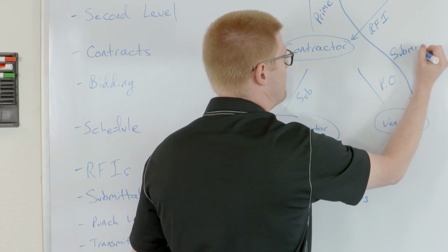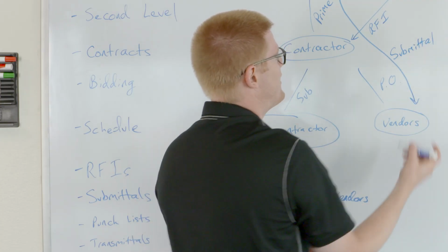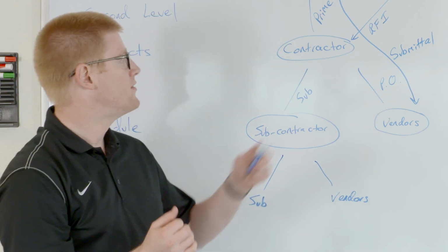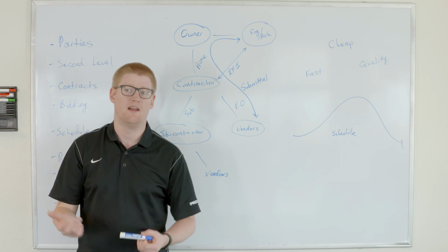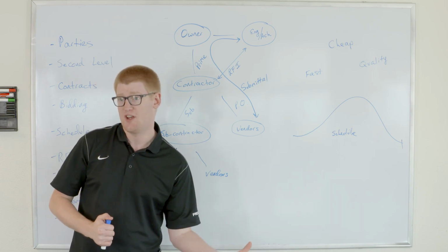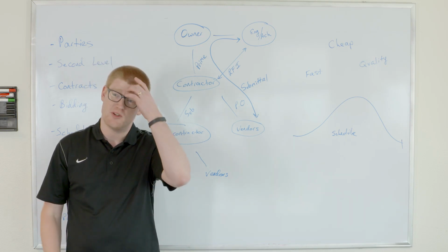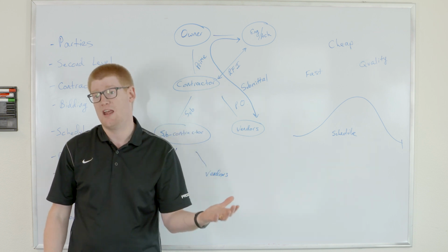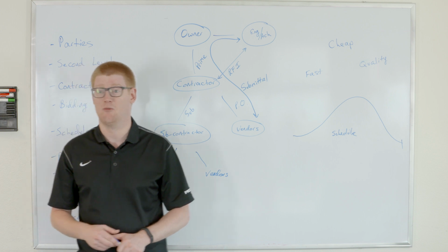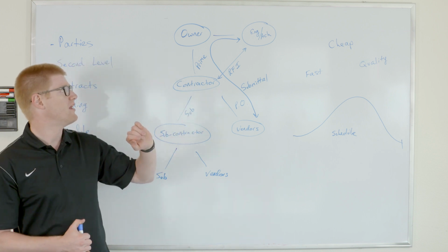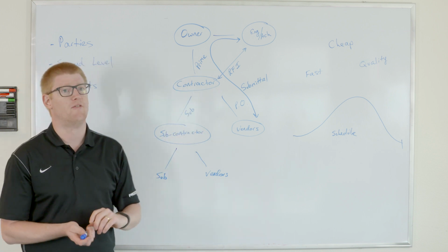So here's our submittal coming through. And you might ask, why does everybody else need to approve this? The contractor often needs to approve for purposes of when it can arrive on site. Can it sit outside? You usually only have so much laydown room, and a lot of things can't sit out in the weather. Some things get stolen, some things just can't sit in rain. So the contractor often wants to have involvement. The owner wants to have involvement as well.